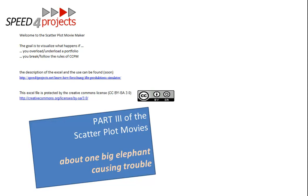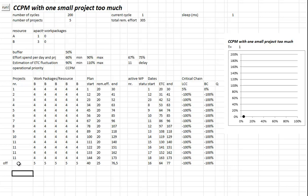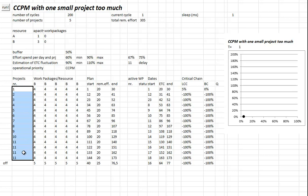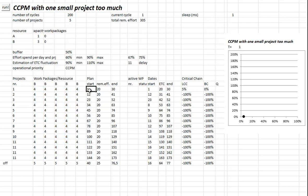First, we have to look at a portfolio. I just take the elephant out. This is a portfolio with 14 projects equally sized in efforts and work packages. There's just one constraint, one resource B with three capacity, which means if you want to do this you have to stagger the projects.